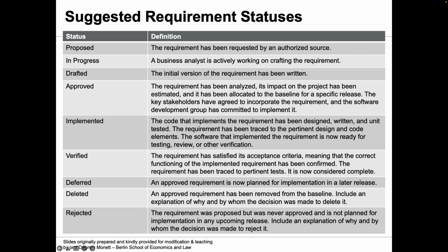So even for the developer, as well as for the project manager, it's really important that the requirements are discussed according to their status. When you put a number, like here, he's clearly defining that 16 of the requirements are still under implementation and not verified, while 9 of them are verified. So the clearer you make it, the easier it is for the entire project team.